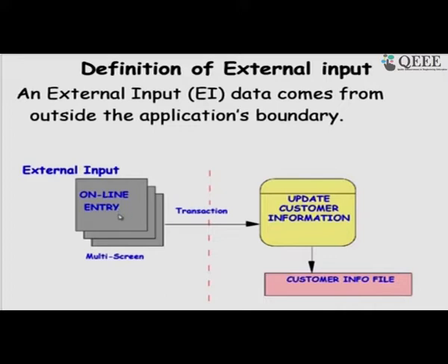For example, as long as the data pertains to one student, like his name, roll number, address, telephone number, etc., that we will compute as 1 because that pertains to one student. So, there is a bit of ambiguity about what exactly is a related set of data that is being input, which updates the customer information, the internal file. So, this is about customer relation software. Here, entering data about the customer updates the internal file.